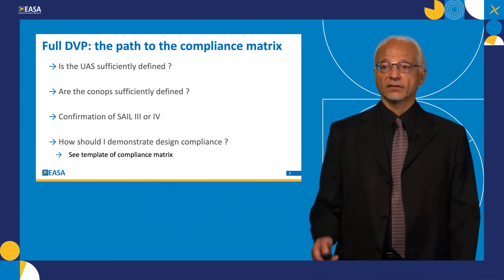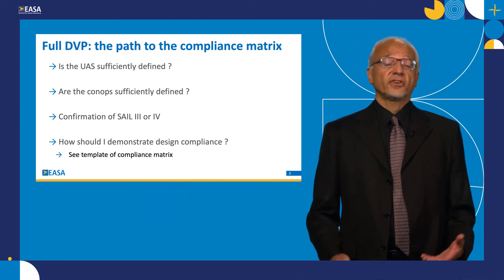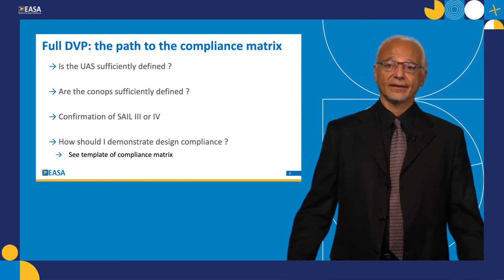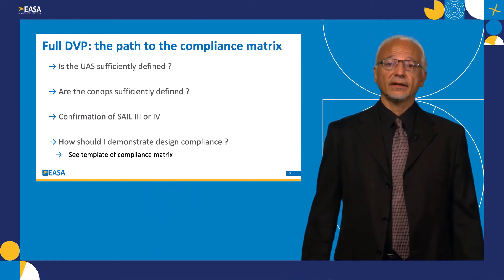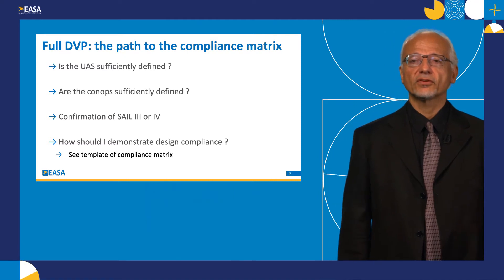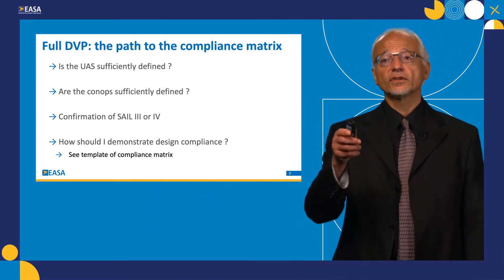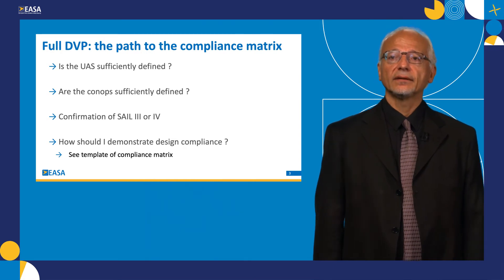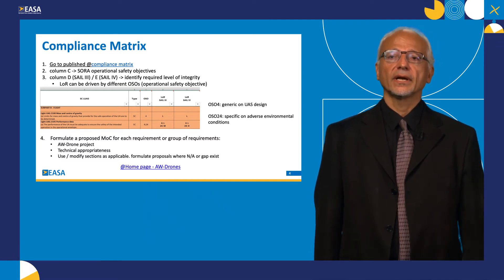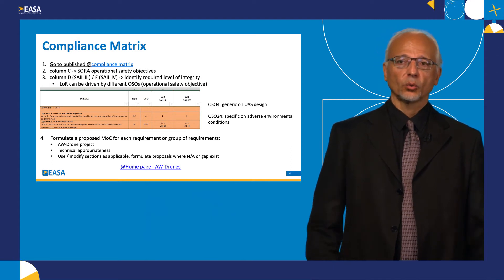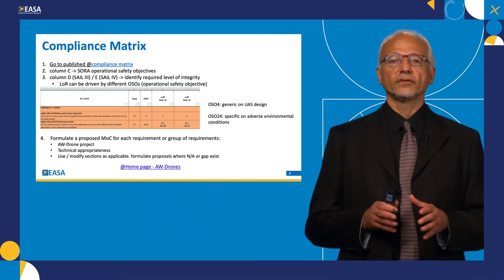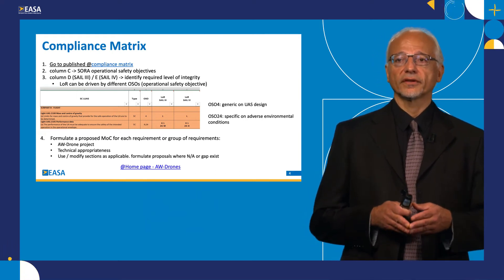So how to substantiate these requirements? First of all, the UAS has to be sufficiently defined — not only for those aspects like dimensions, cruise speed, and kinetic energy, which are absolutely necessary to carry out the risk assessment. To define the means of compliance for Special Condition Light UAS, use the hyperlink shown on this slide. You will find a table defined for SAIL 3 and SAIL 4, and for each requirement of SC Light UAS, this table shows at which level of integrity — low, medium, or high — you will have to define the means of compliance.